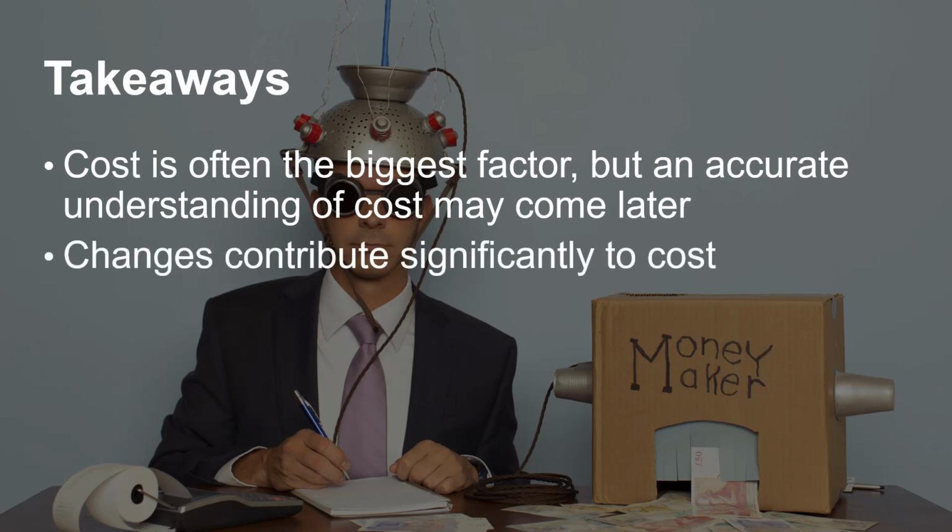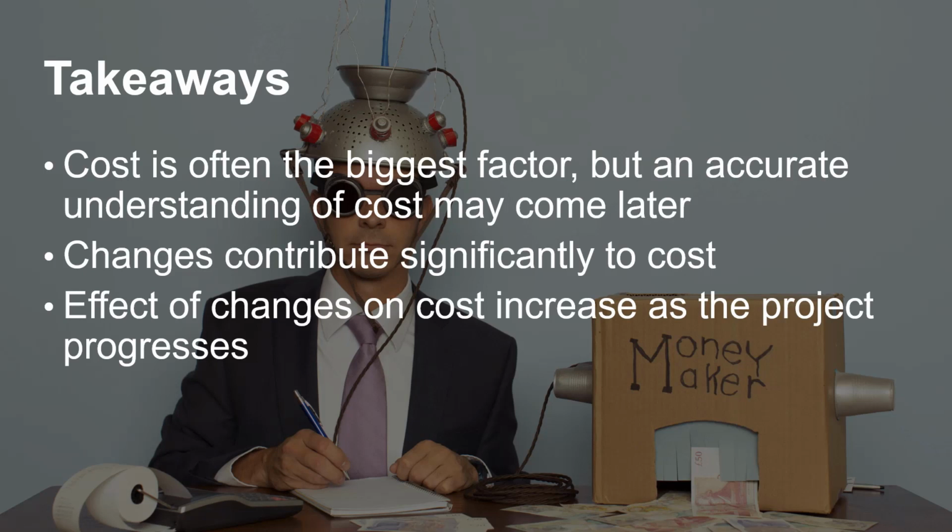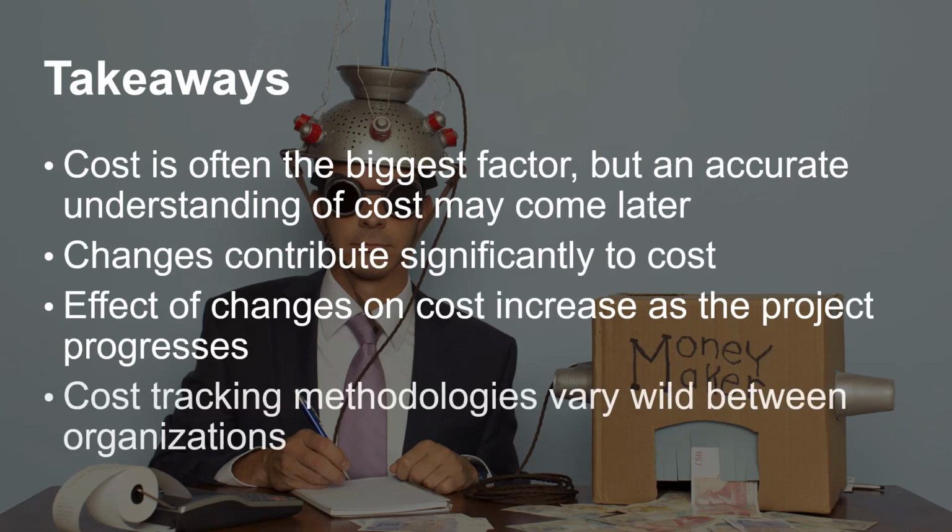Those changes are easier to do at the start of the project, and we need to be thorough in planning. This is true if you are running on a predictive or an adaptive methodology, even though the latter is designed to accommodate change. Changes also impact the cost of the project far more as the project progresses. Changes late in the project can heavily affect the overall project cost, especially if we're talking about a core project change. Lastly, there are hundreds of project methodologies.